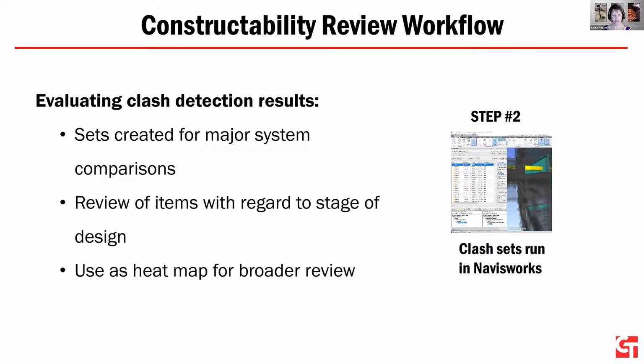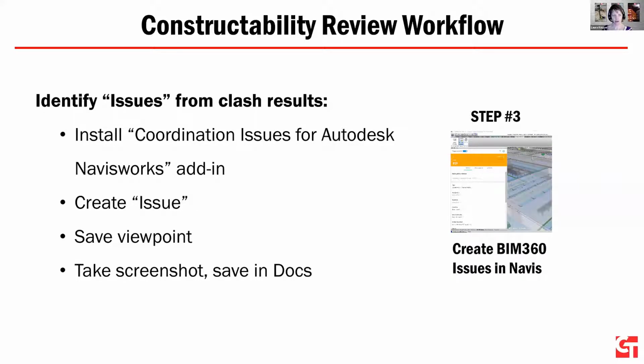Had all my models together, and then clash detection. I mean, Gautam touched on this. I'm creating sets for major system comparisons. Any time you're doing this kind of review at design, like Heather and Gautam were talking about, you really have to keep in mind what you're looking at and what stage the design team is at to eliminate a lot of false positives. I also like to use it as a heat map for a broader review of what's going on. So I ran my Clash in Navisworks just to get an idea of what was going on within this project.